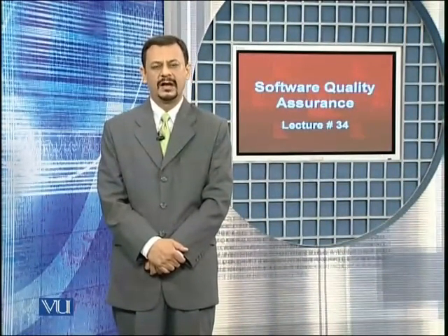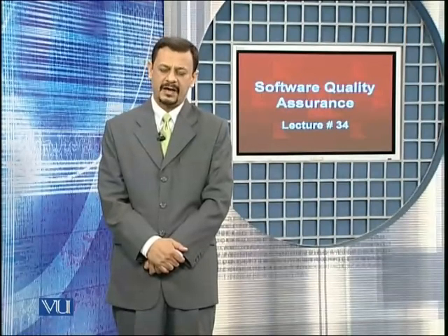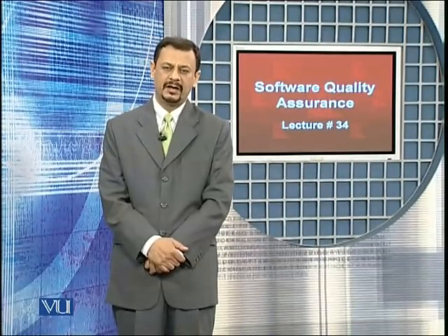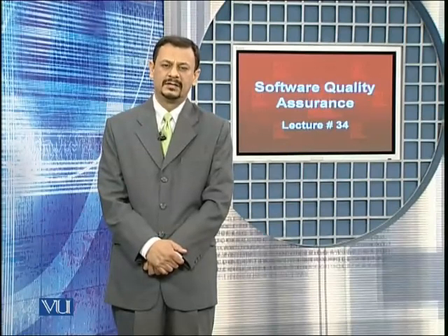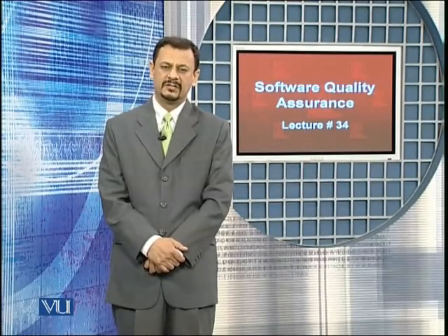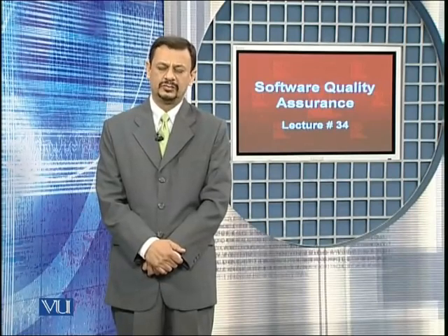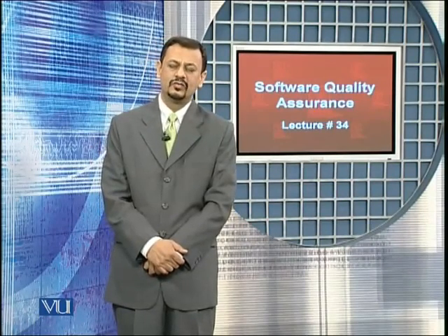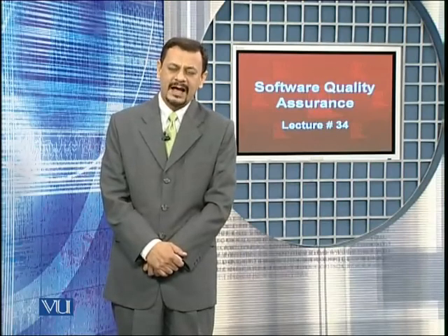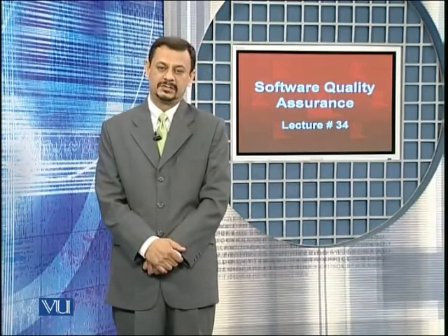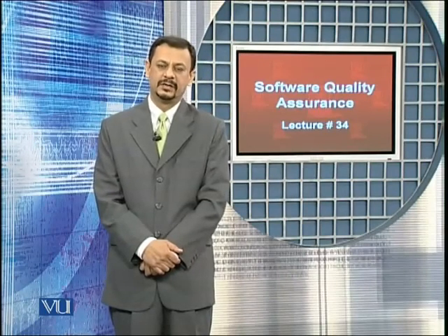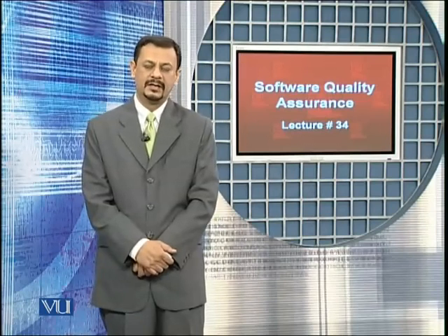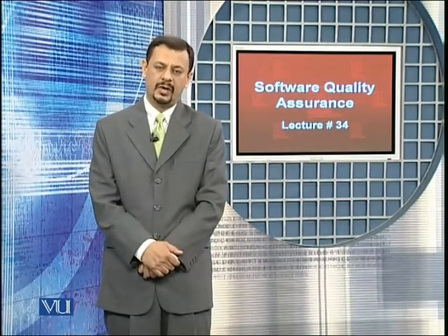And all other SCIs which have been impacted by a change request in one SCI need to be updated accordingly, and we need to run tests and SQA activities on those SCIs also, and we need to ask these 6 questions for each of those additional SCIs which are impacted by the change in one SCI.